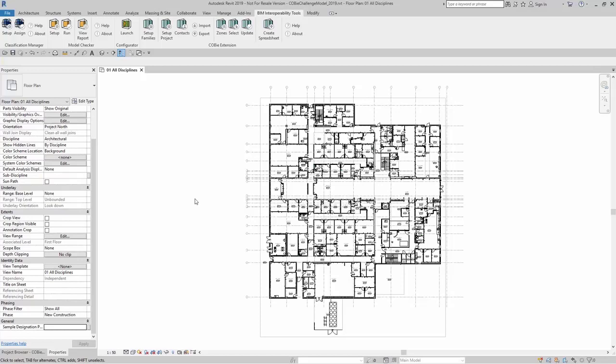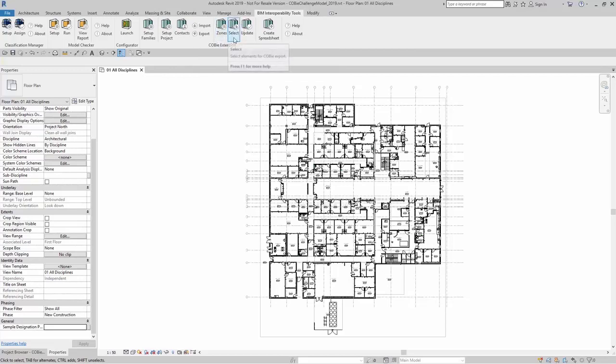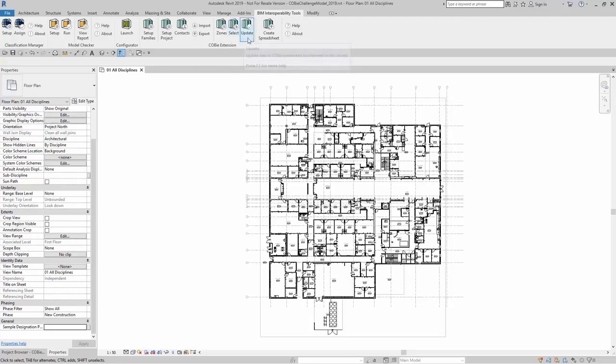For the COBE spreadsheet to be created with its most up-to-date accurate information, you first need to set up your project, your contact information, zones, what elements you want to actually export for the COBE extension, and you need to update those parameters.